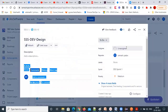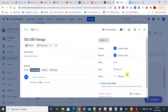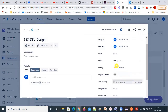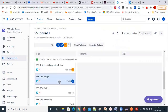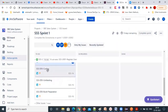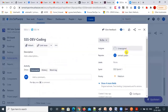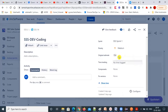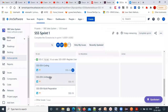I'll put my name as a developer so I can work on these areas. Maybe one day I need for designing — '1d' means one day. You can assign all the dev coding tasks similarly. Since we have only three people, I'm assigning accordingly. This coding will take about five days — one week — and unit testing also.